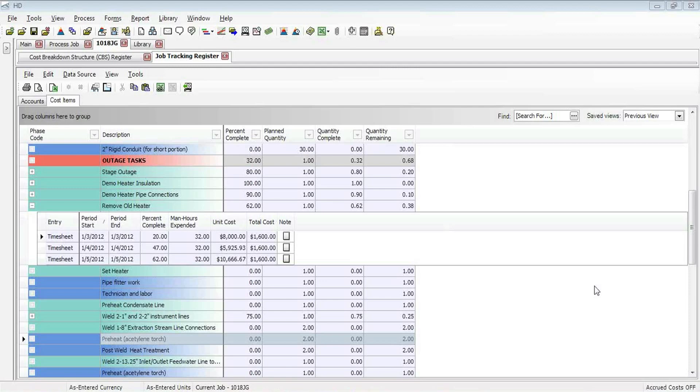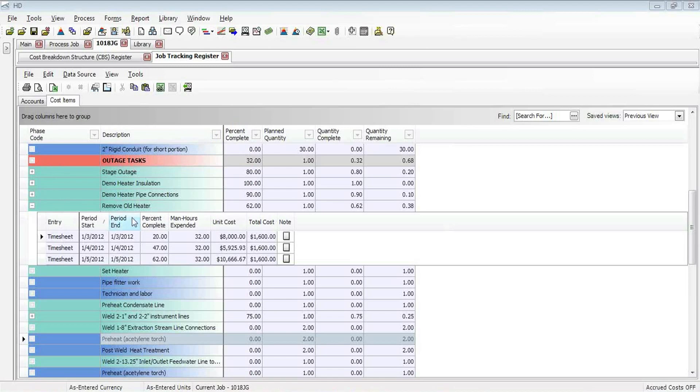You'll notice that I'm on the job tracking screen right now. We're taking a look at a shutdown turnaround outage project, and here are the outage tasks that we are working on. You'll notice one of those tasks is to remove an old heater, and I have three daily entries that have come in to Hard Dollar to show what man hours were done each day and what the percent complete is accumulating to. We can see that we're at 62% right now.